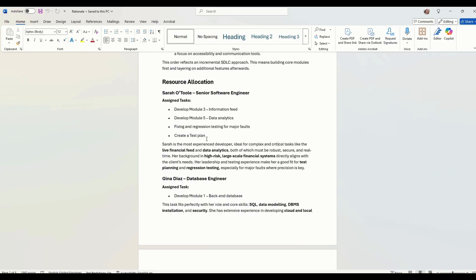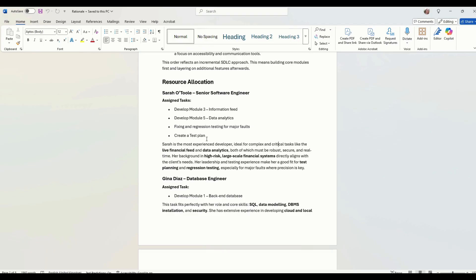Both those must be robust and secure and in real time. So her background in high risk and large scale financial systems, which she says in her little bio, is directly aligned with the client needs. She's got leadership and testing experience, which makes a good fit for testing and regression testing, especially for major faults where precision is key. This is something you need experience on.